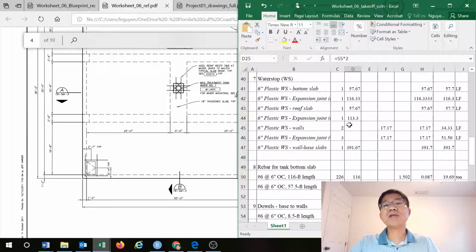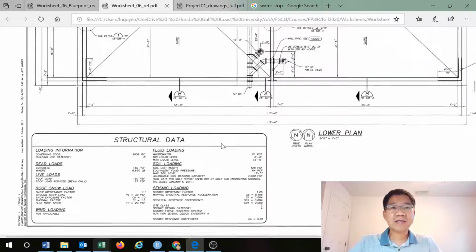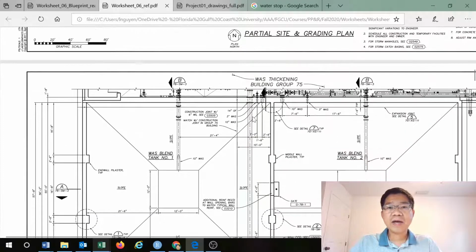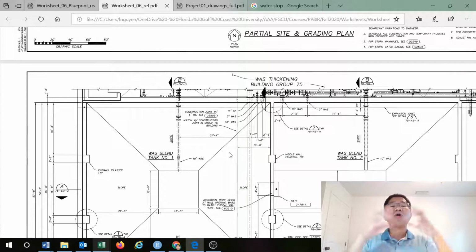So that formwork, water stop, what is that about? And where it shows in the location, that is the most confusion we have there. So you see water stop between the old concrete and new concrete. You cannot place the concrete for the whole tank, maybe the bottom slab, and then go.